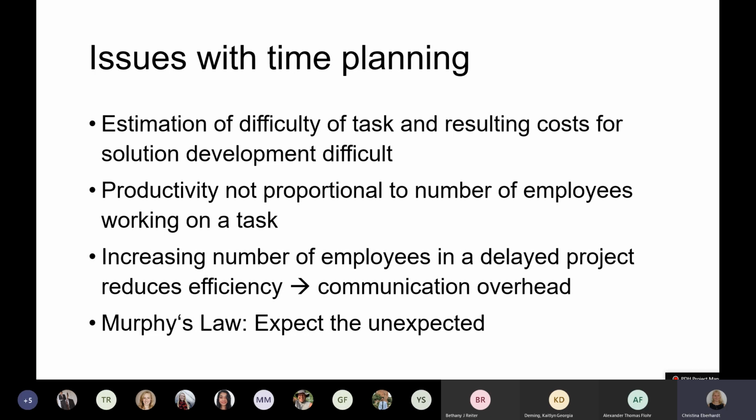It might in some cases, but in many cases it actually slows down the people already working on the project because they have to teach the new people on the team how to access the code, how to deal with certain parts of the code. And then with this additional communication overhead, the team gets slowed down significantly, and sometimes it might just be faster to keep the same people on the team. If they are delayed, they are delayed. We're just going to sit it out instead of moving more people into the team.